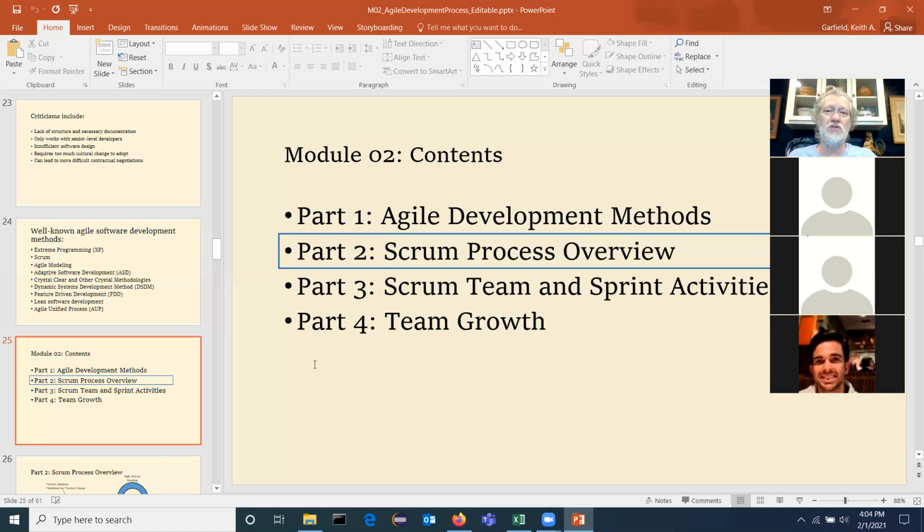By the way, that's the whole point of the daily Scrum meeting. Basically you walk in and you say, here's what I did yesterday, here's what I want to do today, and here's what's stopping me from getting my job done. And that's why it's a short meeting. Everybody does that quickly. If there's any issue that's stopping someone and needs some discussion, then that's going to be the larger part of the meeting. But the whole point is just for everybody to check in and know where they are.